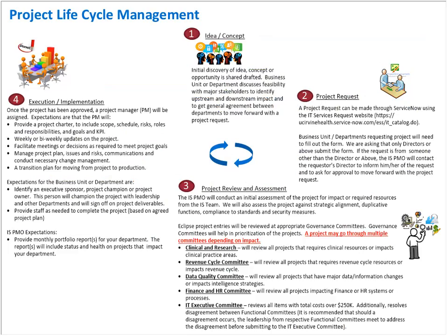Then we have a project review and assessment, and that's where the PMO kicks in. You can see the various committees kick in at that point, because it may go through multiple committees depending on the impact. Assuming it comes out of there, there's the execution and implementation of that particular idea or concept. The project charter, the updates, it doesn't matter what project it is, in execution and implementation it follows each one of these areas. There are weekly and biweekly meetings. We facilitate meetings or decisions as required, and manage the project plan and the transition plan for moving from a project to production.